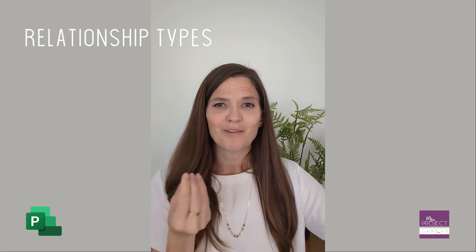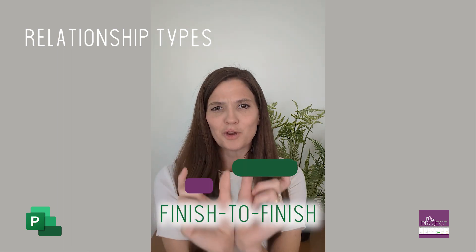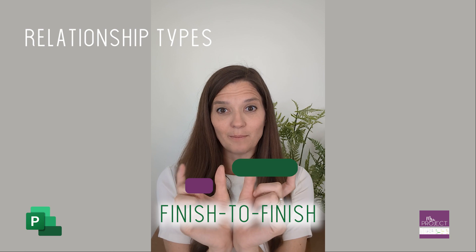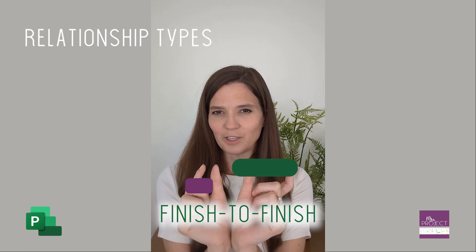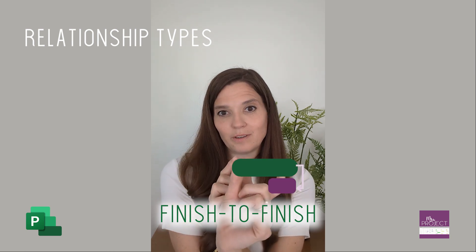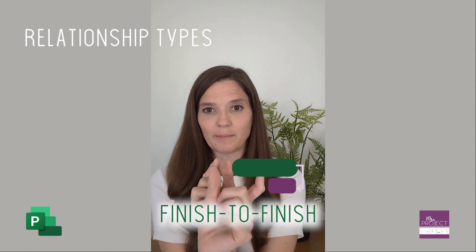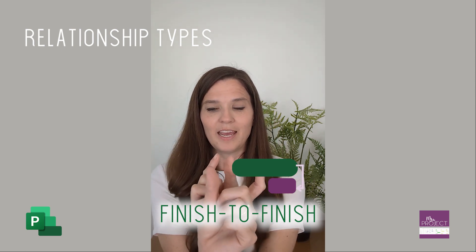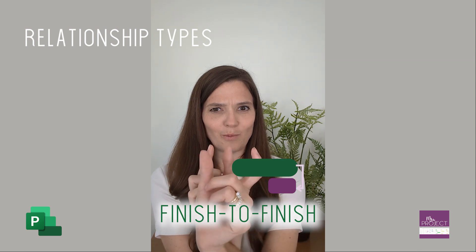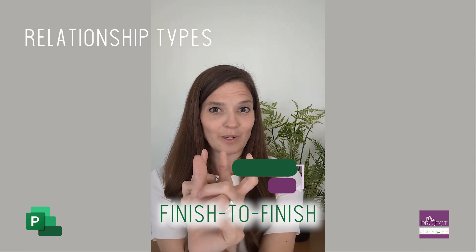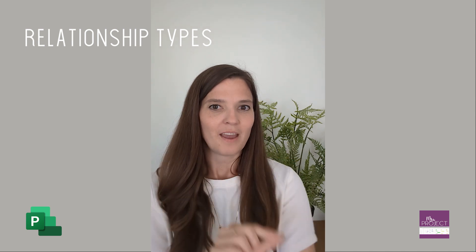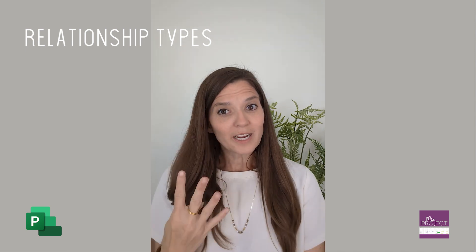You also have finish-to-finish. You have two different tasks of different lengths, but you want them both to finish at the same time. When they just have to finish at the same time, you use finish-to-finish. You can use it when you want to know when to start a task instead of using a negative lag — so there are four types of relationships between tasks.